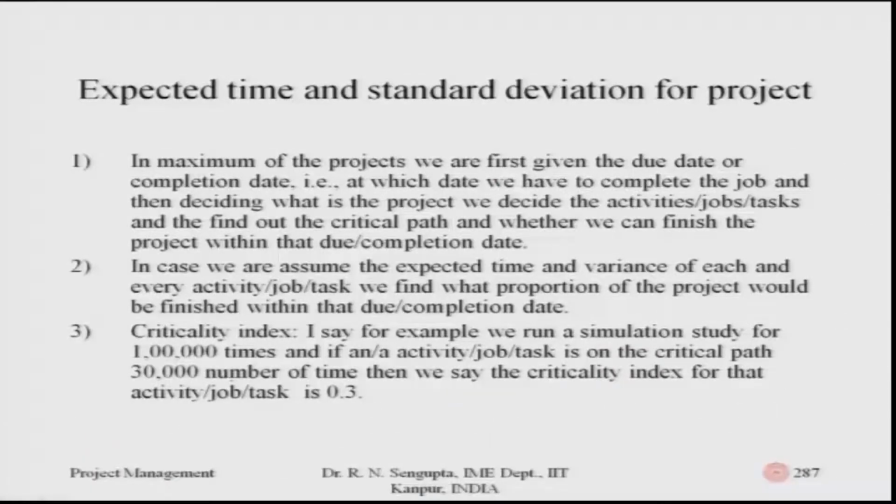So, the due date is now coming into the picture. The due date which is given may be more than T or less than T, so you have to find out how the due date will affect things. Your immediate question would be that if the due date is to the left of T, obviously it should be fine, but the problem is that if there is dispersion, there would be some variance in trying to finish any of a set of activities, whether on the critical path or not on the critical path.